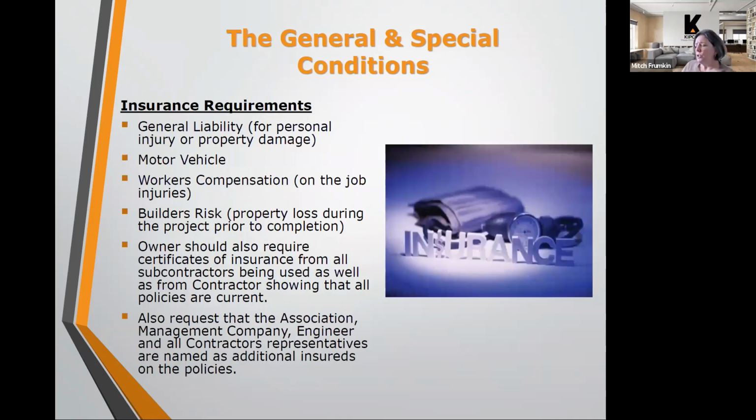Other types of conditions that might be included in the bid documents are insurance requirements. If there's any sort of what happens if somebody's injured on site, or what happens if there's a fender bender, or something goes wrong, there's damage somewhere. So those insurance requirements are spelled out in the conditions. That's something also the attorney should review in preparing the contract between the contractor and the owner.